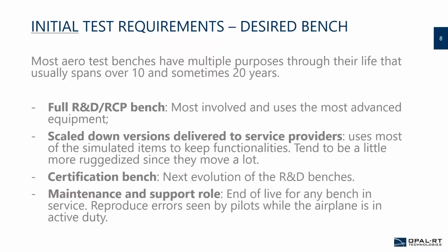Now, since those benches are usually the most expensive ones, it's not necessarily the benches that we want to send to our service providers that will test subsystems of the controllers that we're going to be designing. So in this specific case, what we will have a tendency to do is to do scaled down versions. And those scaled down versions will focus primarily, not necessarily on the specs, but on the functionality themselves. So it's going to be the systems that will have the most simulated items in it, so as to drop down costs and to make it easier to maintain later on.